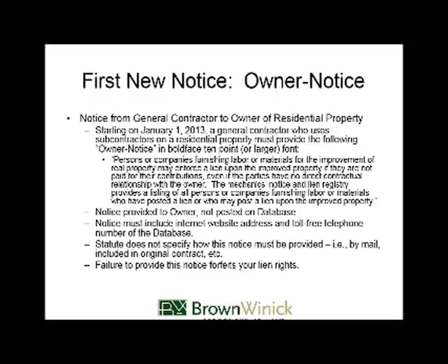The notice needs to be provided in boldface, 10-point or larger font. That's what the statute says. And it needs to say what I have listed here: persons or companies furnishing labor or materials for the improvement of real property may enforce a lien upon the improved property if they are not paid for their contributions, even if the parties have no direct contractual relationship with the owner.